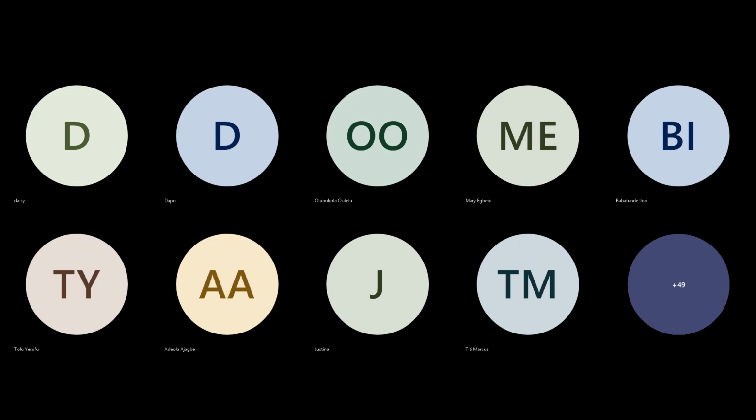So let's say we've done that for discovery and they've looked at it and they've said, oh yes, we're happy to start, we've gone past discovery. Yes, we've checked all the boxes. We're going into sprint one. It's not like at the end of sprint one we have to submit any governance gate again. No. At the end of sprint two we have to submit a governance gate? No, that's not what happens.